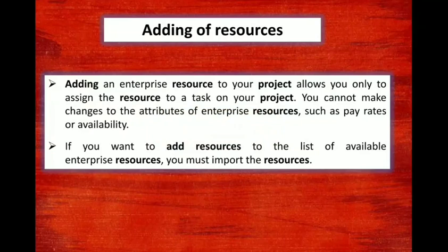Okay, so adding of an enterprise resource to our project allows us to assign the resource to the task of the work. Now if you have created the resource, but if you haven't applied it to your Gantt chart, your resources or your total cost cannot be shown. Now adding of the resource is one part. Equivalently, how you apply the resource also plays a very important role.